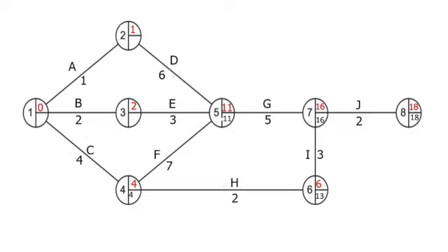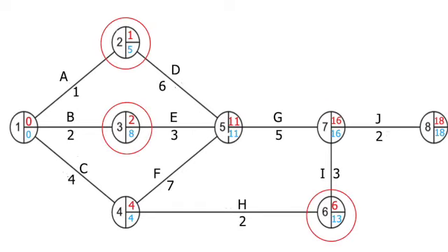And then what we'd do is we'd have to go to node 3 and node 2. So 11 minus 6, 11 minus 3, and we'd get 8, and we'd get 5. Right, now we're at a point where we're getting back to node 1. Now remember, we started at 0 because there was no activities prior. So obviously we're going to finish at 0. We cannot finish any later than 0 because it would delay, obviously, the other nodes. But there's no reason for it to finish later than 0 because, like I said before, there's no activities. So if we did 4 minus 4, we'd get to 0.